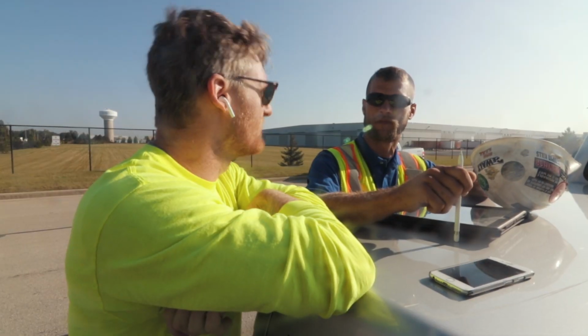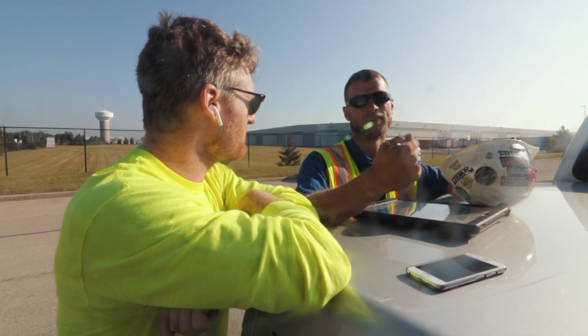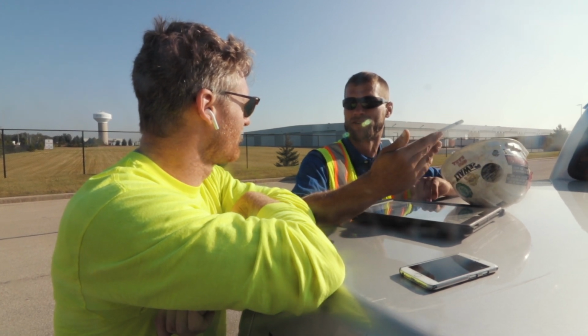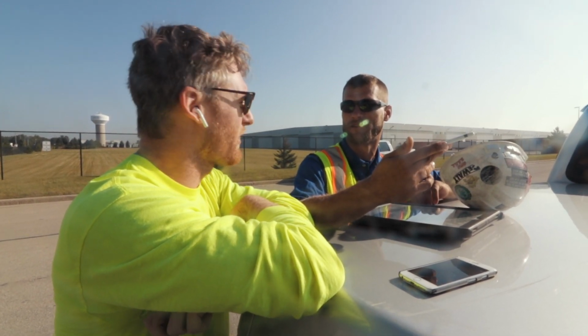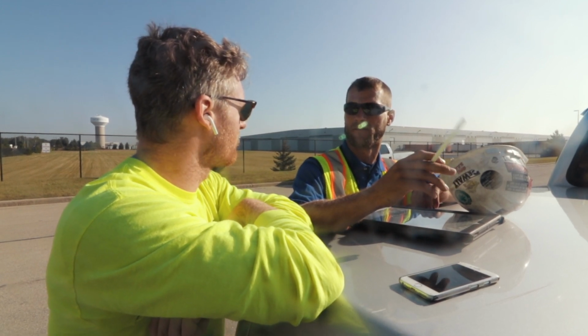Max and I went out to the project. We wanted to see how far out we were as far as roof curbing and framing, but we found out that they're going to be doing the tilt up probably in about 2 weeks. So we're maybe 4 to 6 weeks out from actually doing the roof curbing, and then I think that they said October, November for the interior framing.